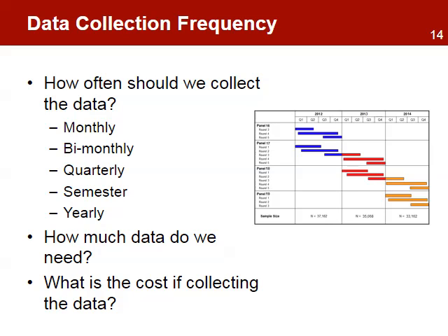The frequency for collecting the data depends on the type of indicators. Some indicators will require collections that are more frequent than others. For example, output indicators are collected more often than outcome indicators. The project manager will need to define the frequency based on the need to have information to monitor the performance and the cost of collecting the data. The project should collect only the amount of data that can be used to monitor the performance. More is not always better.